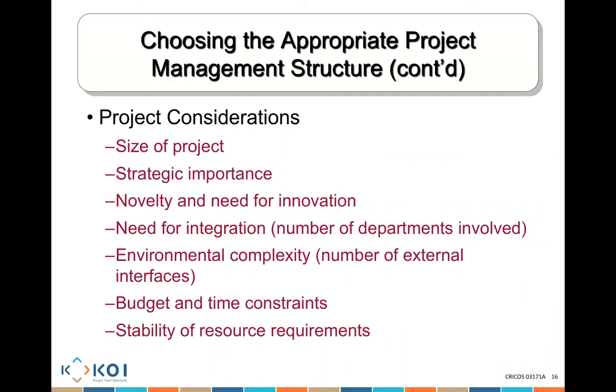Number of departments really involved. Another thing to consider is the environmental complexity. How many external parties who are actually outside my business am I required to work with? The more people outside the business I need to engage with, the more I need to think about dealing with all of those people in a certain manner to get the right outcome. So the more we think about creating a dedicated project team to get the job done.